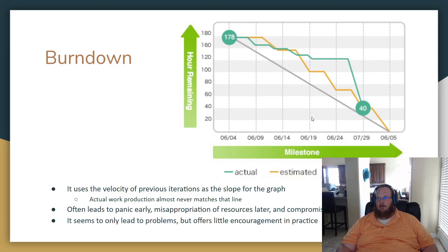And then you come over even further, and let's say you go another 10 days. And after another 10 days or 2 business work weeks, you come up and go, wait, we should be at 50 hours left. But we're not. We're at 110. The problem that we saw 10 days ago has now doubled, and it's much worse. What have you guys been doing?